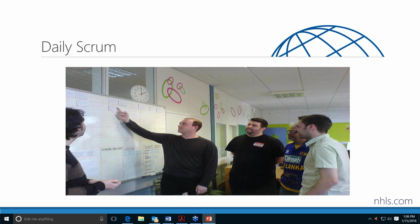Every day we have what is known as a daily scrum, or a daily stand-up. This is the only meeting that the Scrum team has where the customers are available. The Scrum team is where each team member designates what work they have done yesterday, what work they're going to do tomorrow, and what problems they are having. That's the only 3 things they talk about. Customers are invited to the meeting. They can hear the status, they can see the updates, but they're not allowed to ask questions.